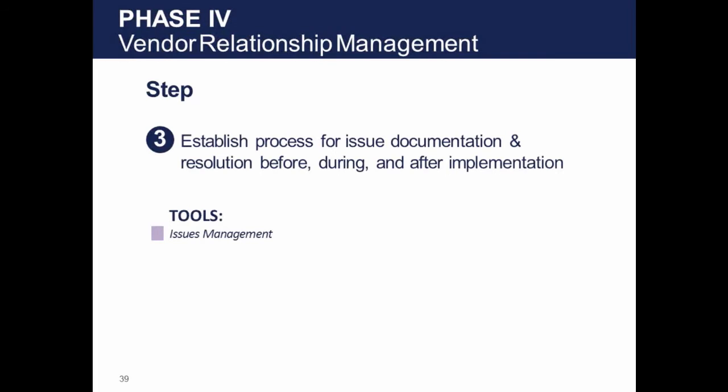Step 3, establish process for issue documentation and resolution before, during, and after implementation. Your organization should ensure that there is a process for documenting and resolving issues that arise. An agreed-upon process for submitting and addressing each issue should be established with your EHR vendor, including the time frame within which an issue will be resolved, disposition milestones, and an understanding of liability and costs associated with each issue.